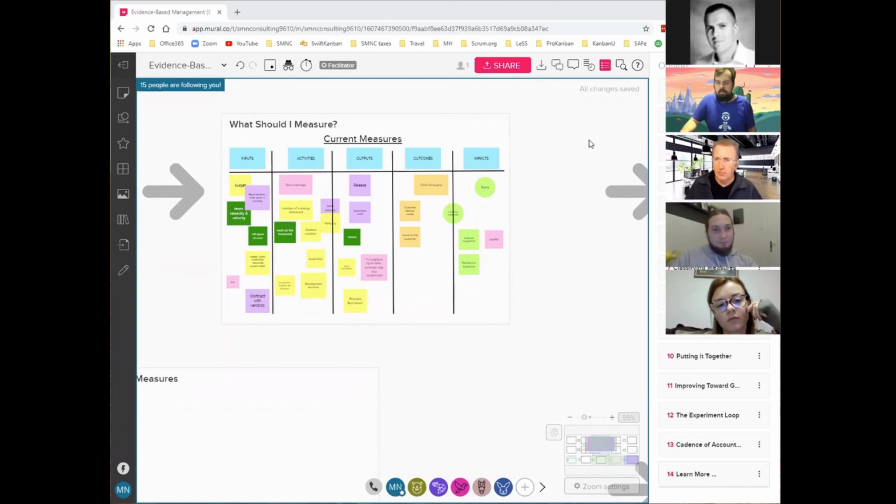One of the things that Kanban gives us is we're measuring something specific, like time or number of items, which is very different than the Scrum world where we have these arbitrary unitless points. You don't have to do that in Scrum, but a lot of people do. And the problem with points or the resulting velocity, for those of you familiar with that term, is that it's not clear that statistical analysis of points and velocity is valid because they're unitless and they're ambiguous.